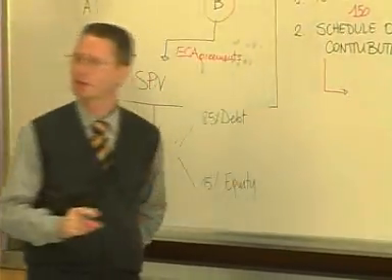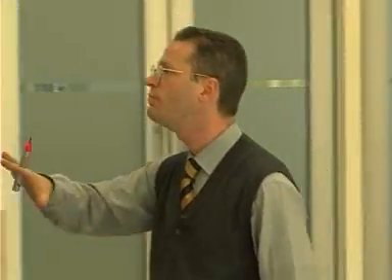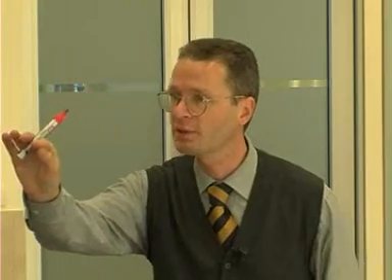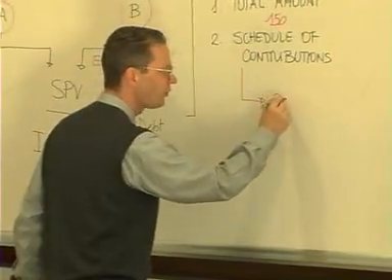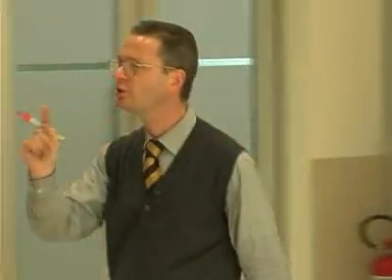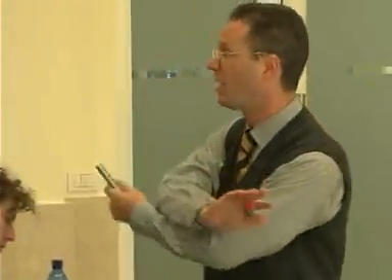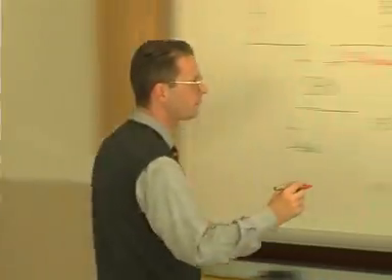Okay, the first basic option is to ask sponsors to provide all the equity, apart, obviously, from the minimum capitalization required for the setup of a limited liability company or a corporation in Italy. The amount is 120,000 euros for a corporation or 10,000 euros for a limited liability company. So apart from this minimum capitalization, all the equity will be provided only at the end of the construction period, only after the total loans provided by lenders have been completely exhausted, been used. So the first option is to provide equity only when the total amount of funds provided by banks has been completely exhausted. You use all the money provided by banks, and only after that, you contribute equity. So, everything after the loans.